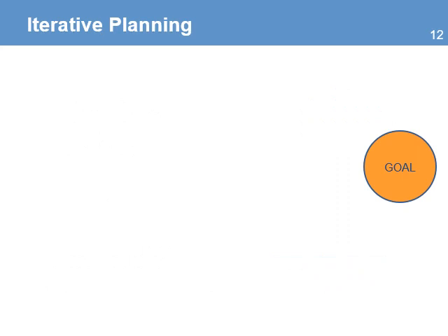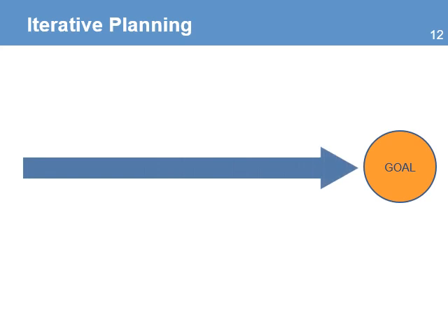In traditional linear project management, the approach is to implement activities under the assumptions that all events affecting the project are predictable, that activities are well understood by everybody, and there is no need to revisit the plans. Unfortunately, this approach proves not to be very effective given the level of uncertainty on many development projects. What happened is that the original assumptions under which the project plan was built changed, and in some cases in dramatic ways. What was originally assumed to be true is no longer valid. Assumptions about approvals, additional funding, economic and social conditions change dynamically, and you need to have the flexibility to adapt to these plans.